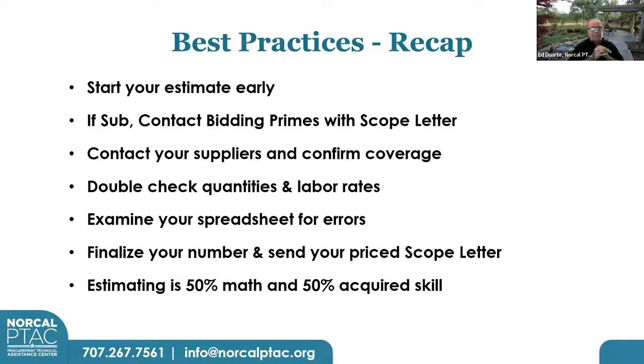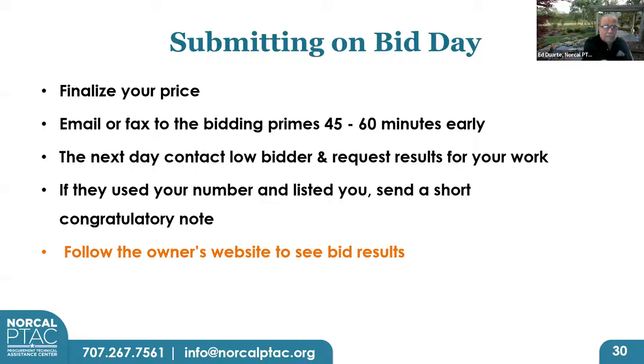I'm trying to cover information that in my estimating class that I taught at Cal State Hayward, it was 30 hours of instruction. And we're trying to do this in 70 minutes. It's an overview, folks. And we do the best we can with the time we have. Finally, on bid day, finalize your price, send it in. The next day, contact the low bidder and request results for your work. If they used your number and listed you, send a short note. Congratulations. And you can find the bid results on the owner's website. It's public information.